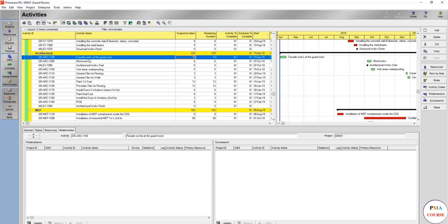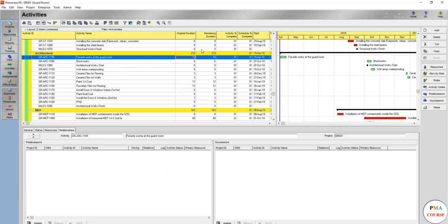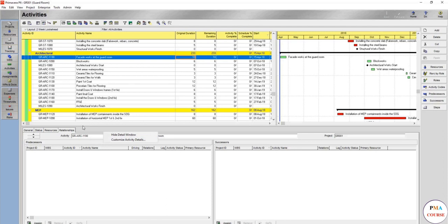There's a way you can add steps for this activity, but there's another way which is visual for each one. You can add steps from here, but another way that's visual for everyone is to make two different activities. The activity tabs can be customized to show steps, which is discussed in a different lecture.